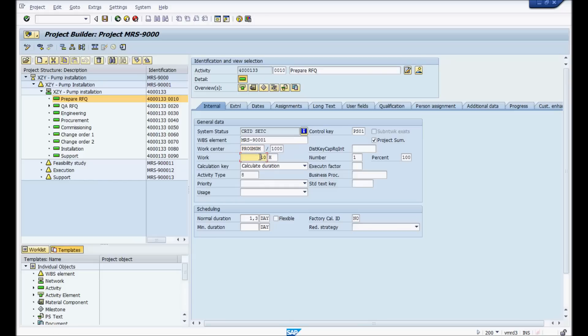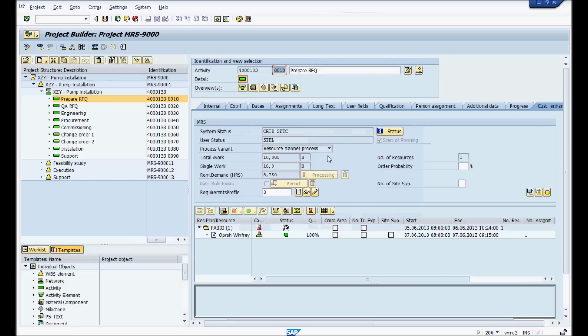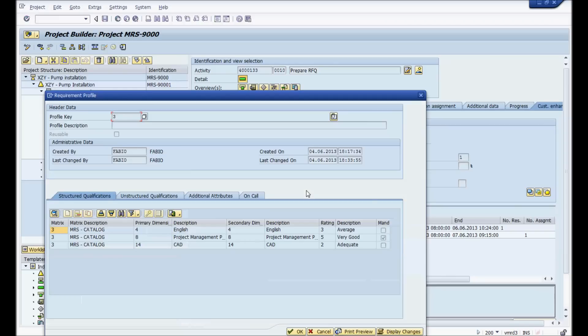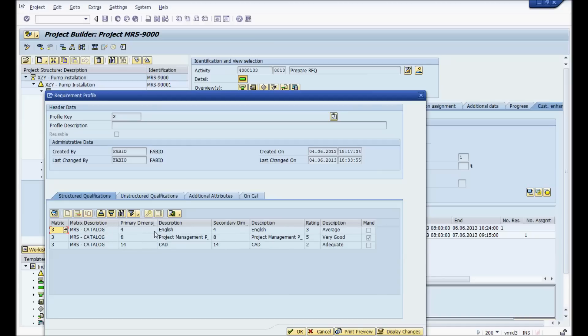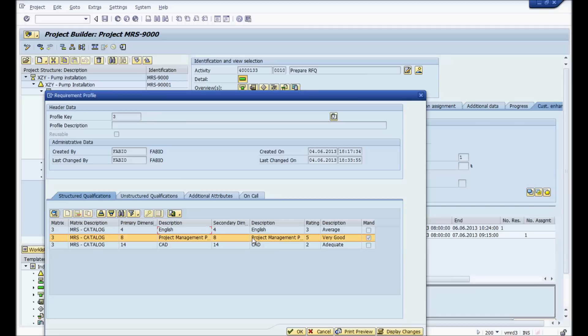Now on top of that, you could also put qualifications they need for a specific activity. This being a prepare RFQ, you have very specific qualifications. If we click here, you'll see that this particular activity requires somebody speaks English at a good level, very good project management skills, and then has adequate knowledge of CAD.